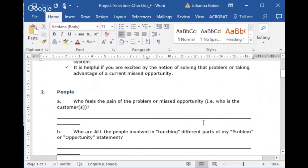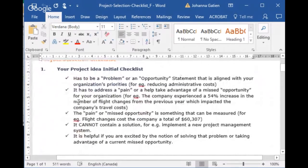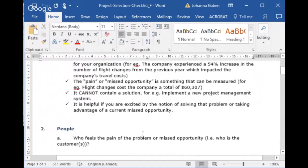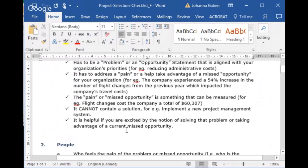On the people aspect: who feels the pain of the problem or missed opportunity? You need people engaged. In the example with reducing prep time for patients, the ultimate customer was the patients. They had an ambitious goal of reducing the whole time by 15 minutes, but after a test run they realized the patients actually liked the extra time, so they only reduced it by 10 minutes. It's about testing it out and thinking about the people aspect.